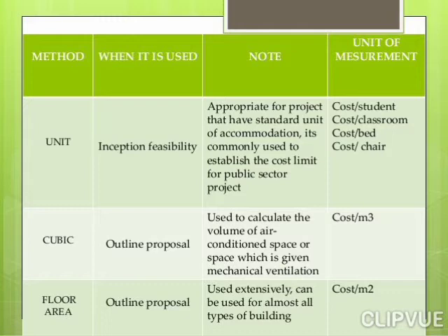In the floor area method, it is used when the outline is proposed. It is used extensively and can be used for almost all types of building. The unit is cost per meter square.